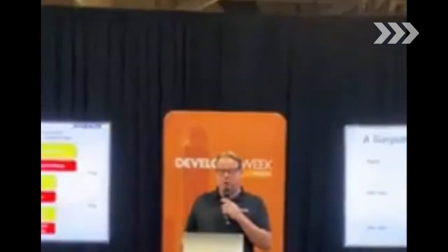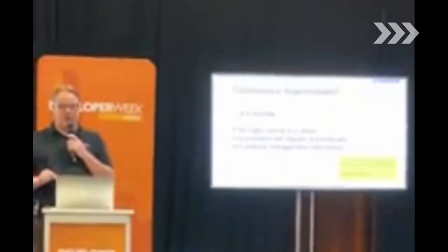It's a huge problem. A lot of times people are in the wrong roles and you've got to move them around. There was a company I went to where the requirements were terrible, because a non-technical product manager would hand things over to the dev team and they would build it and nothing came out right. Even though they were building features, nothing ever worked. It didn't meet the needs. So I took a developer and turned them into a technical analyst, basically. You could call them a product owner in modern times. That eliminated that problem, and a lot of what we gained was just from that. We got rid of that first category I was telling you about, which is requirements confusion. All of a sudden we were building things that actually worked because we knew what they were. So don't skip retrospectives. That's my advice to you. They're very important.